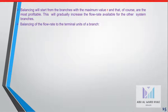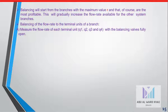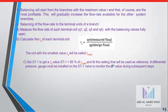Balancing the flow rate to the terminal units of the branch: measure the flow rate of each terminal unit Q1, Q2, Q3, Q4 with the balancing valves fully open. Calculate the R_u of each terminal unit: R_u = Q_m / Q_p. The unit with the smallest R_u, called R_u minimum, will be the reference. Set ST1 to get R_u value of ST1 at 95% of R_u minimum and fix a setting that will be used as reference.